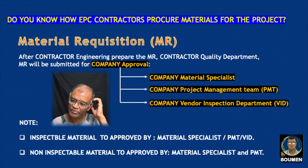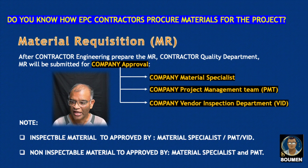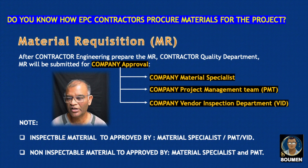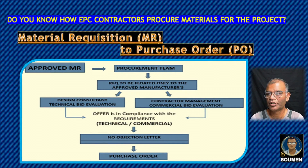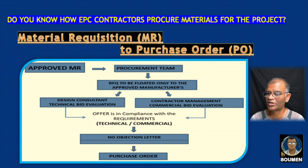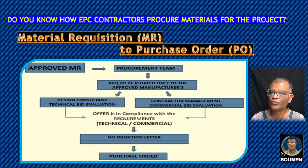We must note that inspectable materials are to be approved by material specialist, PMT, and VID; non-inspectable materials need only material specialist and PMT approval. Now that the material requisition is approved, we need to purchase the material. For purchasing, we need to prepare a purchase order — but it is not a straightforward step. There are many sub-steps to follow before preparing the purchase order.